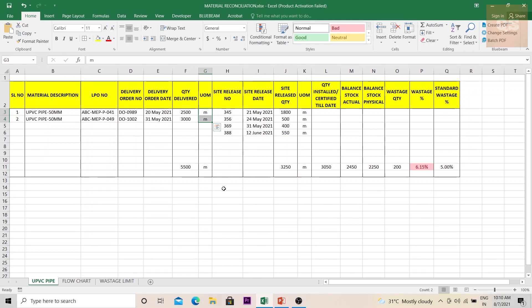Material reconciliation is done for measurable items — the major countable items like panels or DBs. For such items a material reconciliation is not done because they can be easily counted, and only what is required for site is ordered and used. There is no need for a separate sheet for such items. For MEP materials — mainly pipes, ducts, and cables — these are the measurable materials, so you can easily understand how much is installed and from the LPOs how much material was delivered to site.